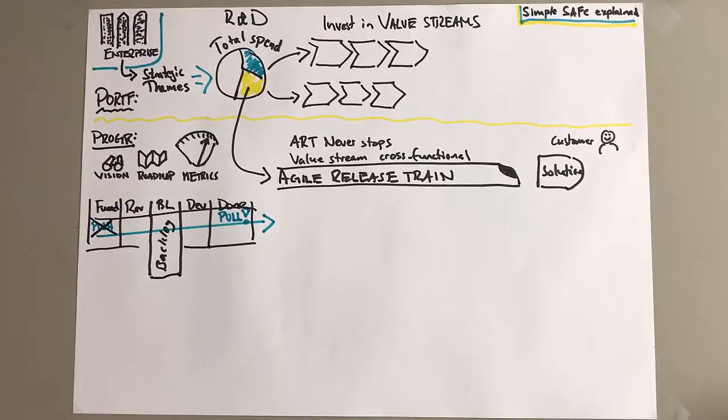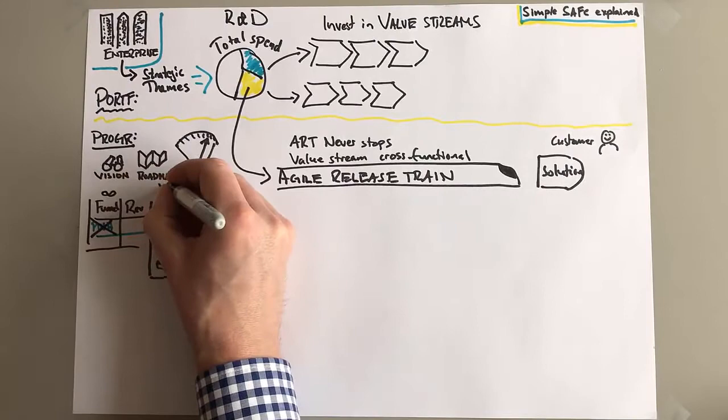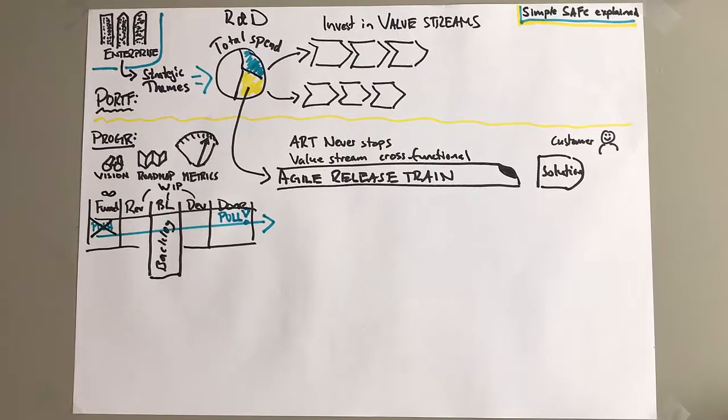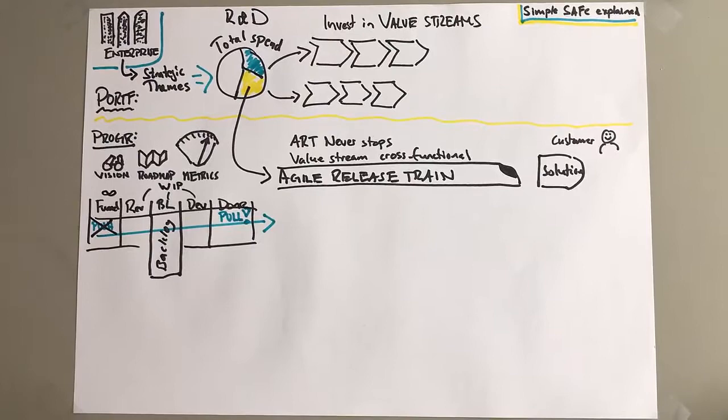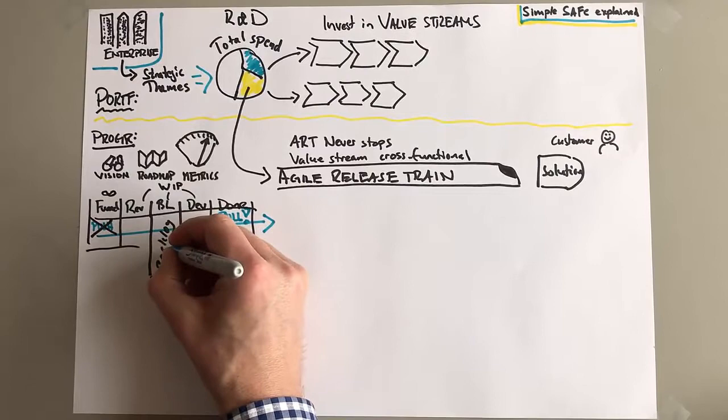Not pushing more work into a delivery organization. That isn't necessarily going to mean that you have more work coming out in the other end - often it's quite the difference. So what you want to do is you want to limit WIP, work in progress. Limit WIP. You can have as many ideas in your funnel as you want, but you limit WIP for the others.